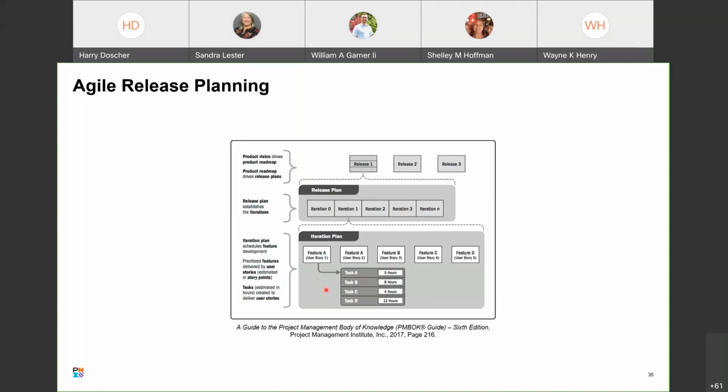What you'll do is determine what can be delivered going that way. You take a look across here for the features, any critical resources, any critical people that are required, or any critical lab time, things like that, machines that are required to implement these particular user stories need to be taken into consideration. So that if you've got these 4 tasks,